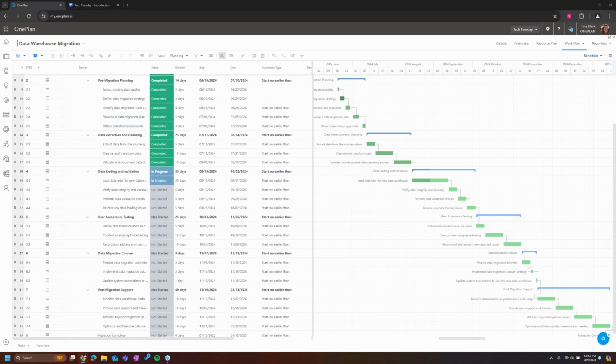And I'm going to take my little pen, and I'll show you guys. Lag being, you're creating space, right? You're expanding this space between your tasks. And instead of manually entering in the start and end dates for these tasks, which will enter constraints into your schedule, you'll use a lead and lag instead.